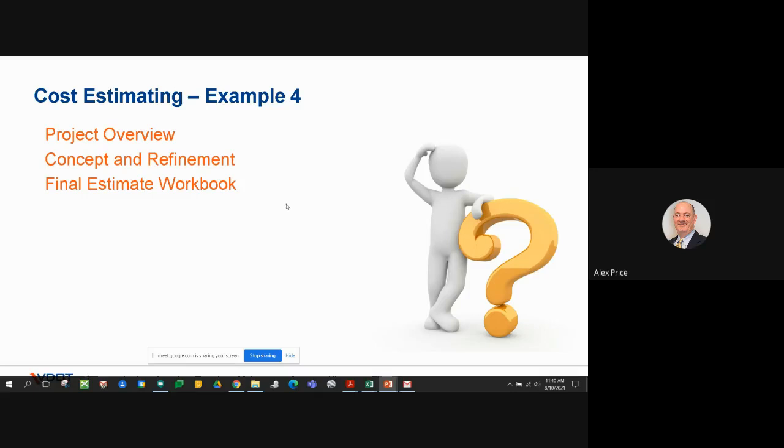If you're only requesting funds for construction, that's all we need to see. And I think through the portal, we'll have to work with you to give you guidance there through our programming and planning office. But we just need to see what's really only being applied for. If it's construction funds, we just need to see the construction estimate. And I can add, Alex, in the workbook, they could put under the assumptions in the PE and the right of way that these things are being done by the locality with locality funds prior to the project funding. Yes, definitely so.